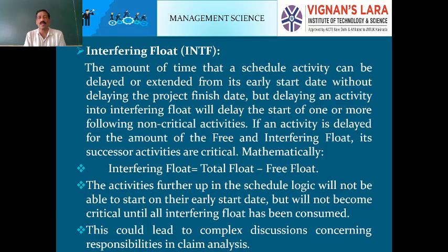Further, the activities further up in the schedule logic will not be able to start on their early start date, but will not become critical until all interfering float has been consumed. This could lead to complex discussions concerning responsibilities in claim analysis.